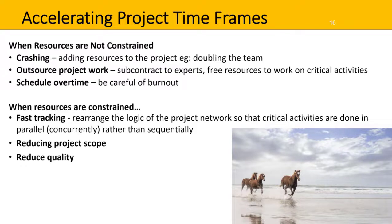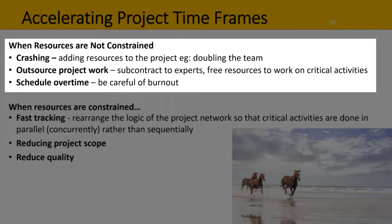There are a few options for reducing that time frame. When resources are not constrained, you might try crashing — that is, adding resources to the project. For example, you might double the size of the team. However, be aware of the law of diminishing returns, which means just because you double the team, it doesn't mean you'll get it done 50% faster. You might also outsource some or all of the project work, so by subcontracting to experts they can get things done faster and potentially better, and this will also free up your resources to work on critical activities.